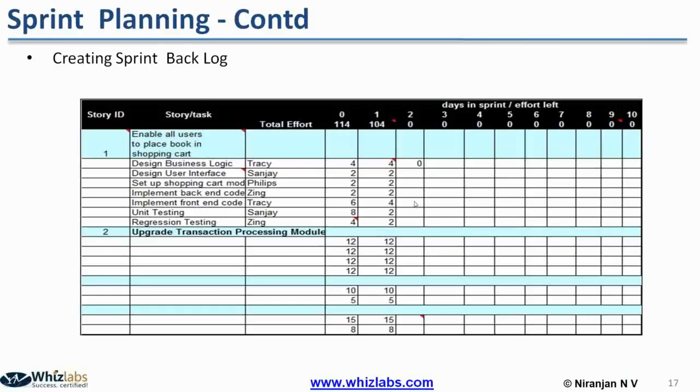Okay, or it could be that she is not able to progress with her task at all on that day. So it will block, and because of this, as Ani said, it will also block other tasks. So like this, every team member has to update against their respective task how many hours are remaining. Then everything is done on the first day. If the task is not started, they can just copy whatever is estimated.